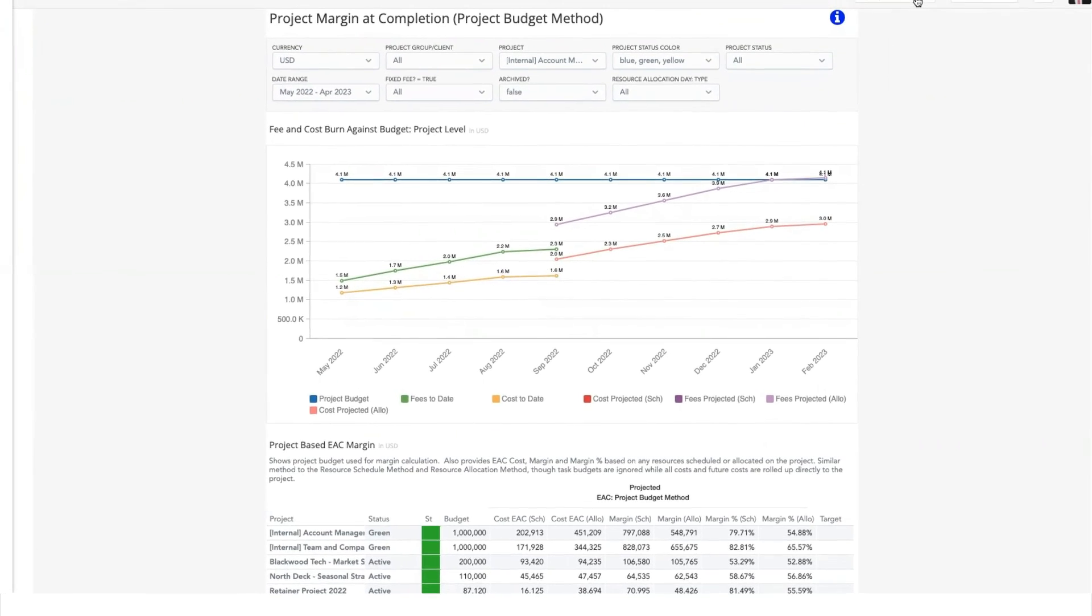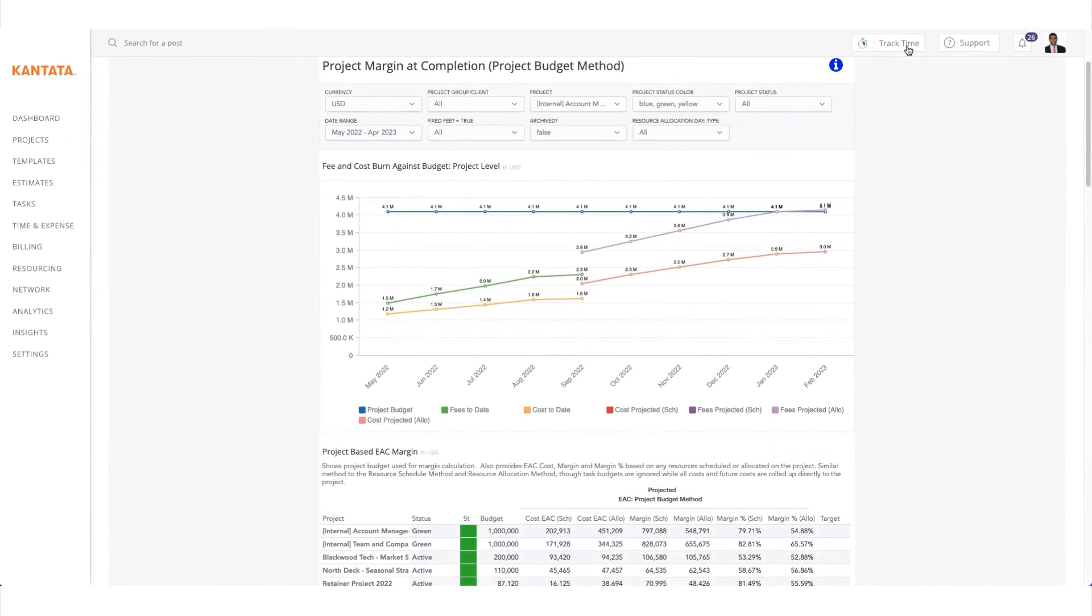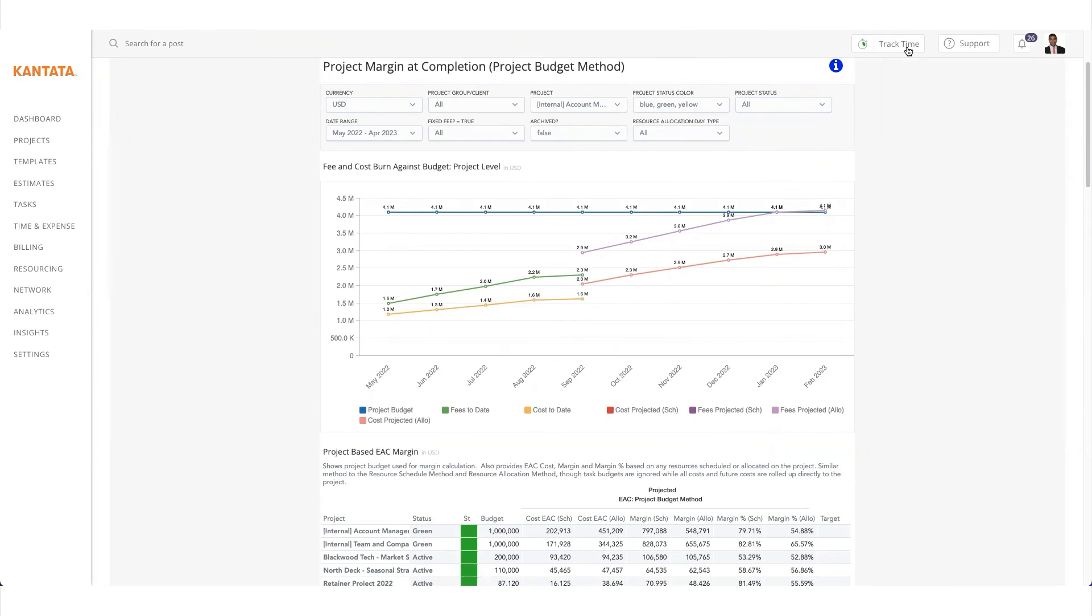All of the data that has been collected up to this point can then be used to go back to the beginning of the project life cycle to help fine-tune the estimation process as actual data is compared to the estimate. From there, process improvements can be made for the next time a similar project comes up.